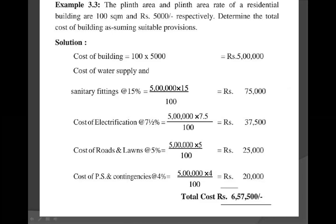Next, one by one we calculate the provisions. First, cost of water supply and sanitary fitting — each is 7.5%, so combined water supply plus sanitary fitting equals 15%. Cost of water supply and sanitary fitting at 15% equals cost of the building multiplied by 15 divided by 100, which is 5 lakhs into 15 divided by 100, equal to 75,000 rupees.